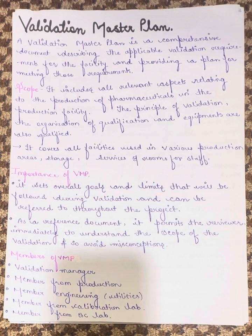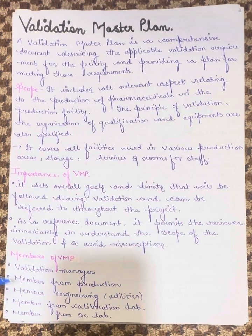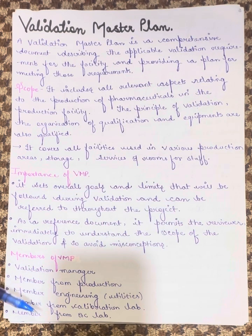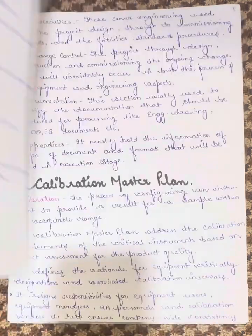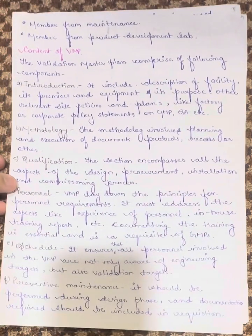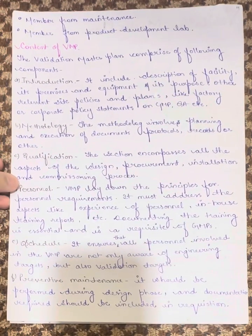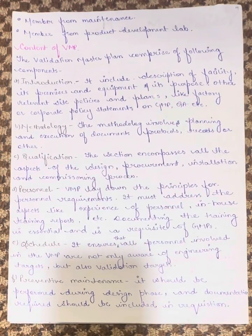The members of the Validation Master Plan include the validation manager, a member from production, a member from engineering, a member from the calibration lab, a member from the quality control lab, a member from maintenance, and a member from the product development lab.